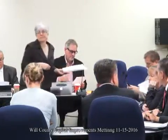Good morning. So this is our bi-weekly construction report update. The first one is the billing update. We have 2 billings in September and October. For September, we had 11% complete for the earthwork, which was a total of 4% complete on the total project. For the month of October, which was our second construction bill, we had a 6% total project complete, and that related to 44% of the earthwork and about 50% of the site utilities and 7% of the steel, which equated to the fabrication. So that's the billing update. Right at this moment, we're about 6% complete on the total project.